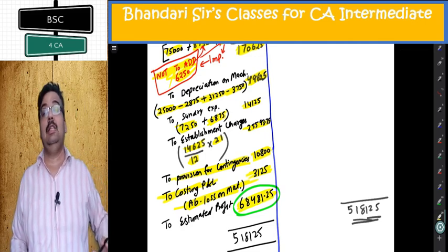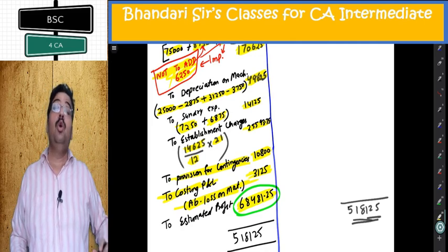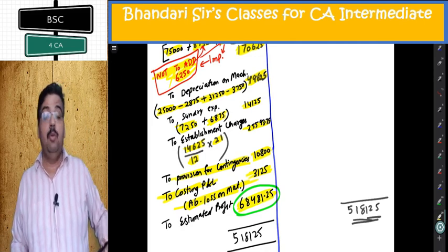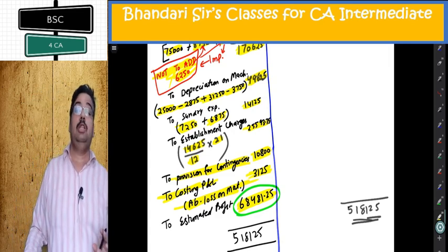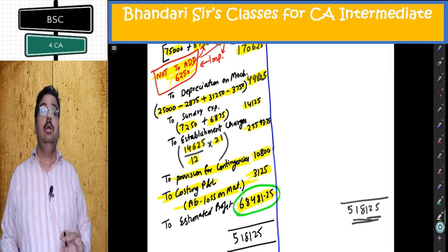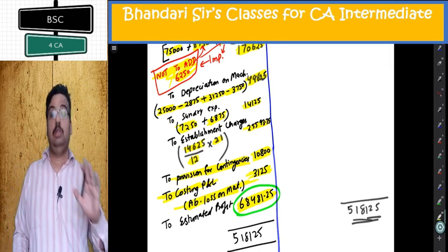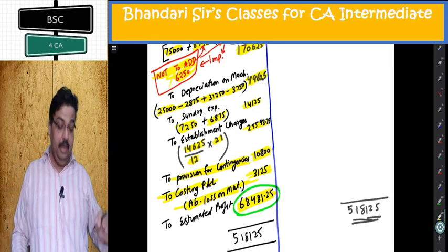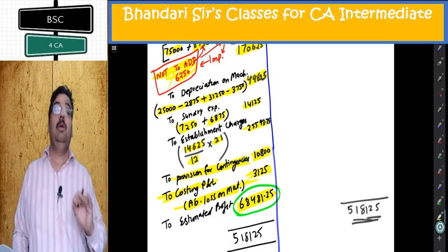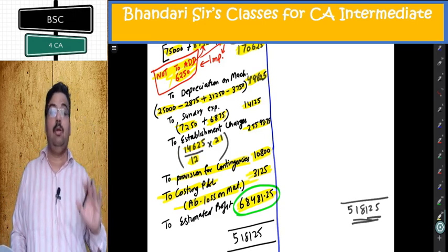6848 is the correct estimated profit. I don't apply further formulas. If the question had told me, I would be applying further formulas based on estimated profit or notional profit. But the question does not want profit to be taken to costing P&L. So this is the complete answer that I am going to give in the exam. Notional profit and estimated profit for this contract.